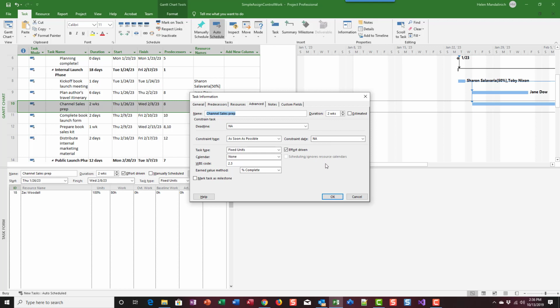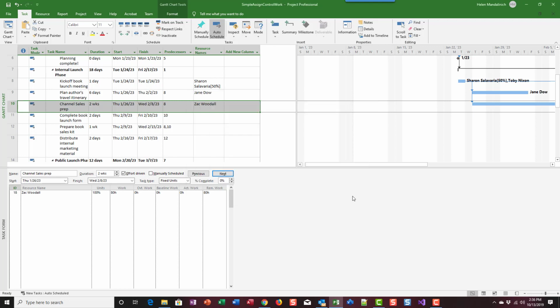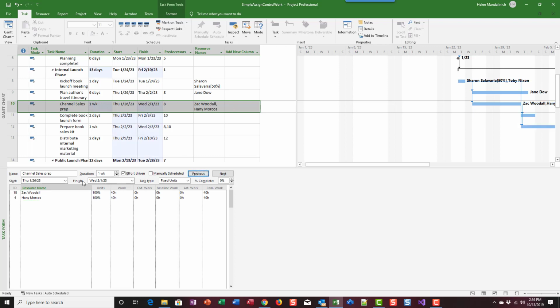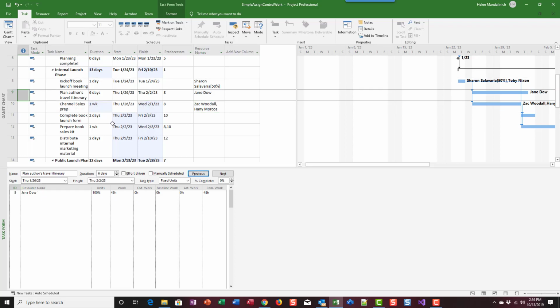Okay, so now we need to add Henry to the task. So we're going to click down here in this task form. We're going to click Hanny Marcos. Look at this, it's still 2 weeks. We're going to go ahead and say okay, and look, now we have 2 people that can give 100% of their time to this project. So it decreased the duration to 1 week.